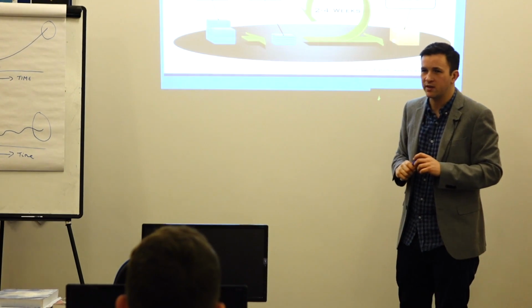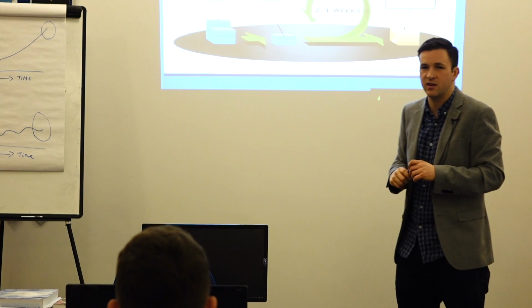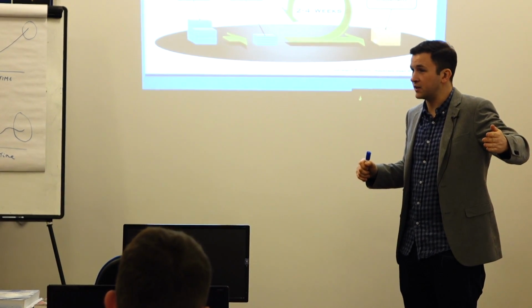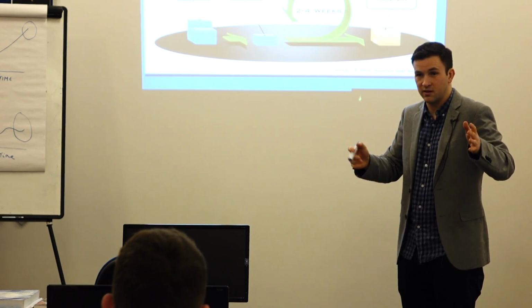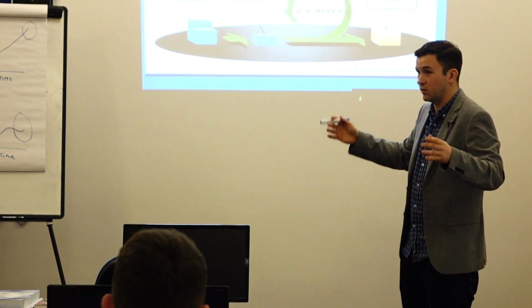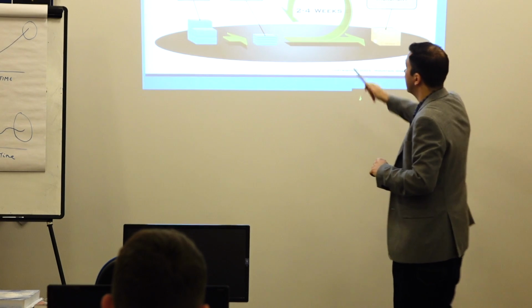Then the sprint, generally they're 2 to 4 weeks. We tend to go with a 2-week process. So the first Monday morning of the sprint is this planning session, and we spend a whole day on the planning for the 2 weeks. Then at the end of that 2 weeks, we have a kind of review session, and that 2 weeks is the sprint.